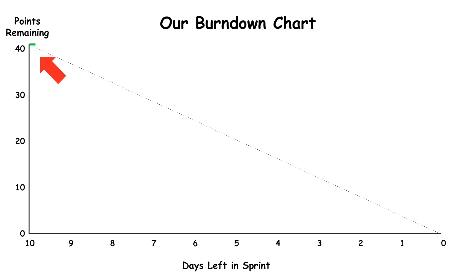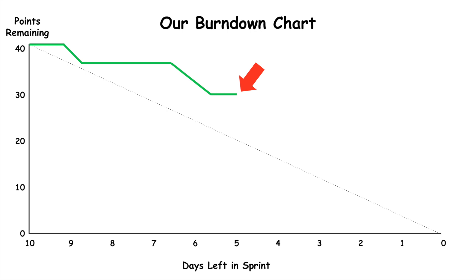Suppose the team signs up to complete 40 points in a two-week sprint. The burndown chart will show 40 points and 10 days remaining. Suppose the team then completes 10 points in the first week — the chart will show 30 points and 5 days remaining. This location on the graph will be well above our pacing line, giving us early warning that our sprint goal may be in jeopardy.